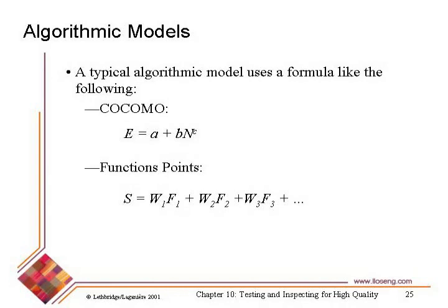You'll notice that it is a model which is exponential, which reflects the concept that software systems, as they get bigger, they tend to grow exponentially in cost. They don't grow linearly in cost. And so a system that is twice as big doesn't cost twice as much, it costs substantially more than that. And that's bad. And that implies keep your system small to stop it from running out of control.